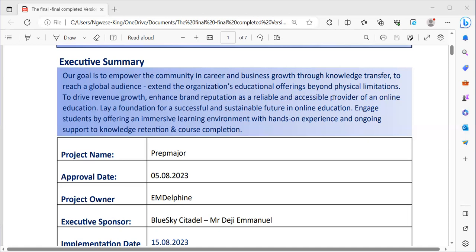For example, let's say you have 20 customers now. If we do this project and customers can reach you 24/7, in the next 6 months we're projecting that you would have 500 customers. Do you see what I mean? If you have 500 customers, that's going to lead into money, isn't it? All right? So it's important that the value we're capturing is tangible. Let's not capture value elusively.